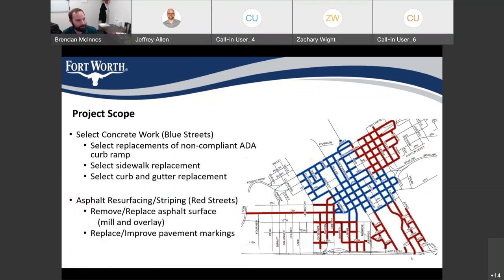For project scope: the blue streets will have select concrete work — select replacements of non-compliant ADA curb ramps, select sidewalk replacements, and select curb and gutter replacements. The red areas will have asphalt resurfacing and striping. We'll be doing remove-and-replace of the existing asphalt surface, coming back with a mill and overlay, and then replacing pavement markings after the overlay is completed in those areas.